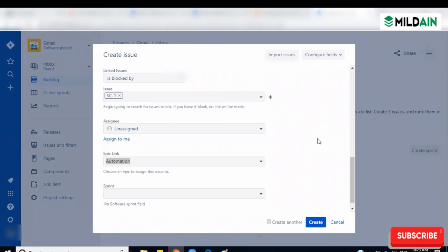If yours is a weekly sprint, maybe you will get 4 sprints. Then you will create 4 sprints here, and in each sprint you will be selecting some stories. So in sprint one, you have 4 stories, and all the 4 stories will be pulled with the 1.0 version number.